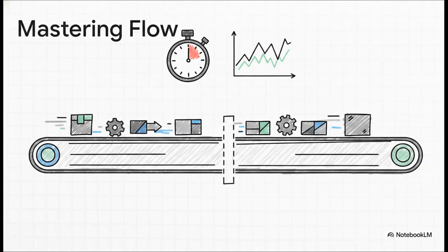To really own that flow, you can customize the heck out of these boards. You can use split columns to implement a true pull mechanism. So instead of just blindly pushing work forward, you clearly see what is just sitting there, idle, waiting to be pulled into the next stage. Swimlanes are great because they let you fast-track different classes of service, like those critical midnight hotfixes.